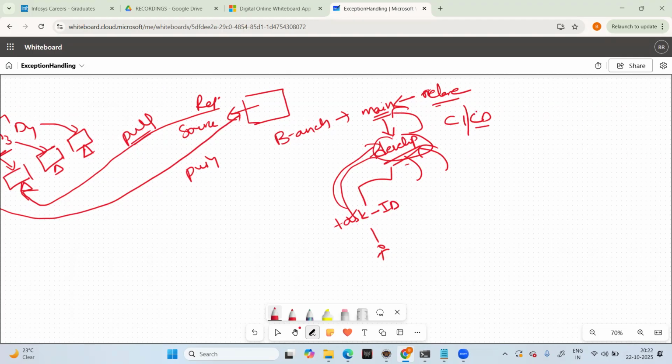Now, from features, they will be converted into stories. From the stories, the developer will ask any questions. For example, if you have any questions to implement, what are the scenarios, all those questions you will get clarified here itself, which we call grooming sessions. We'll be having these kinds of grooming sessions.